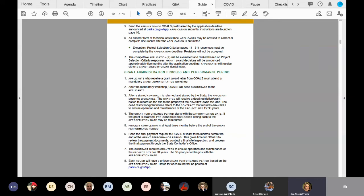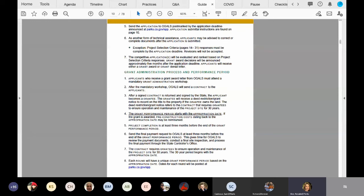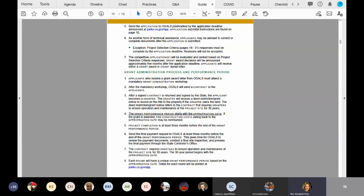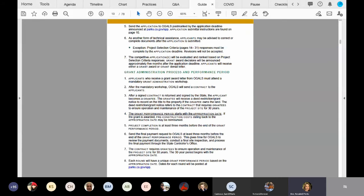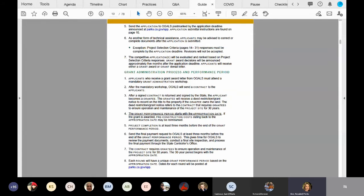And the reason for that is explained in number six here on your page. It really gives you time and us time to review your final payment request documents that you submit to us in March of 2025. That's the end time frame that we can accept a project to be complete. So it gives us time to review your payment document, come out to your site and do a final site inspection, and then come back to our office and process the final payment request through the state controller's office before the funds liquidate on June 30th, 2025.